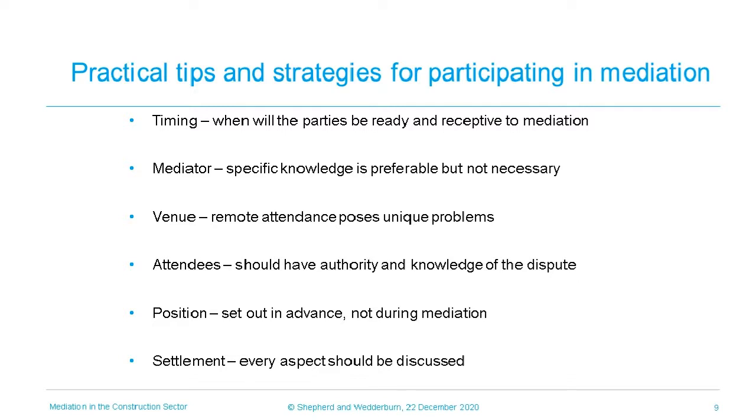Non-financial elements are, as mentioned earlier, a key benefit of the mediation process. It is important that parties don't lose sight of these throughout the process. There may be an assumption that once the numbers are agreed, the lawyers will be left to draft the rest of the settlement. This, however, runs the risk that some seemingly trivial piece of the settlement is actually a deal breaker for the other side and puts the whole process at risk. It is best practice, therefore, to ensure that everything is discussed, financial or non-financial, and therefore considered in the process of reaching a settlement. Finally, should a settlement be reached, it will need to be documented.